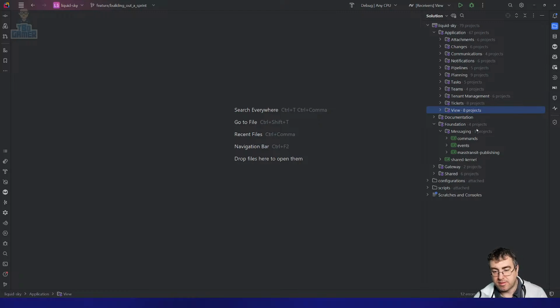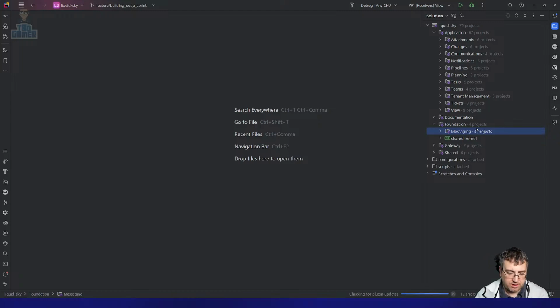Yeah, maybe because I'm so bad at it, one of the things I want to do at my place is start encouraging developers and QAs, when they're doing stories, to create a testable checklist. What are the steps necessary, and document those out. Here's how we validate this is actually doing what it should do. And these are the steps a developer should go through beforehand, as the bare minimum of validation before handoff, and make that the definition of done.